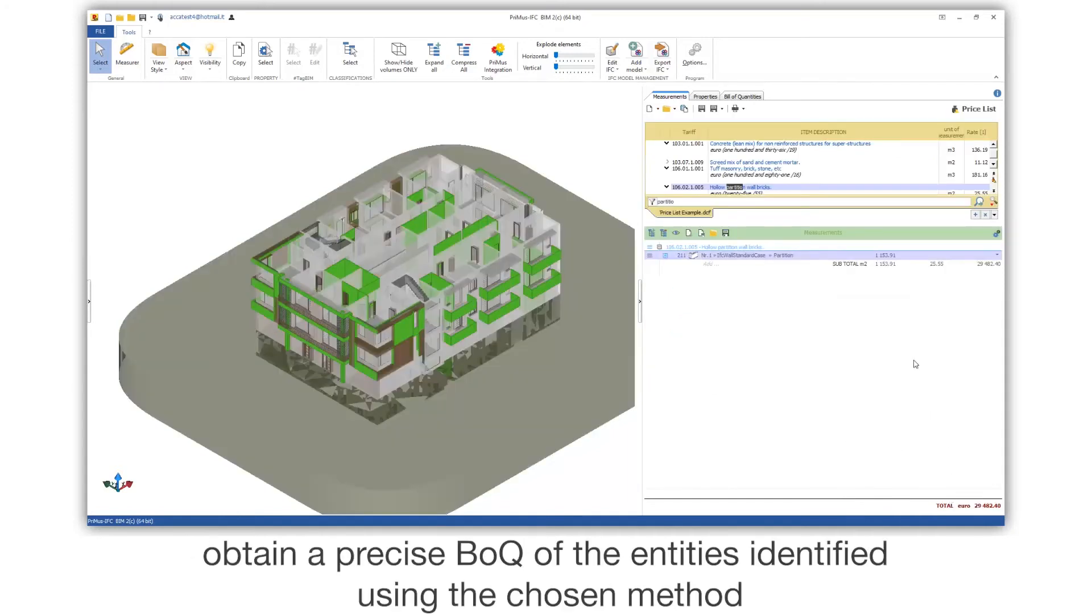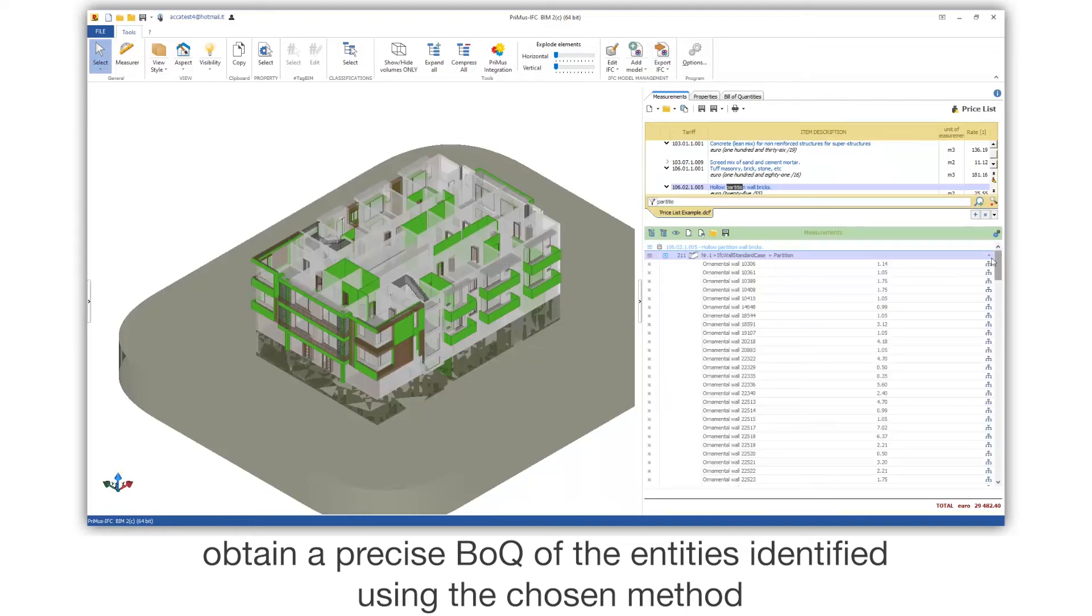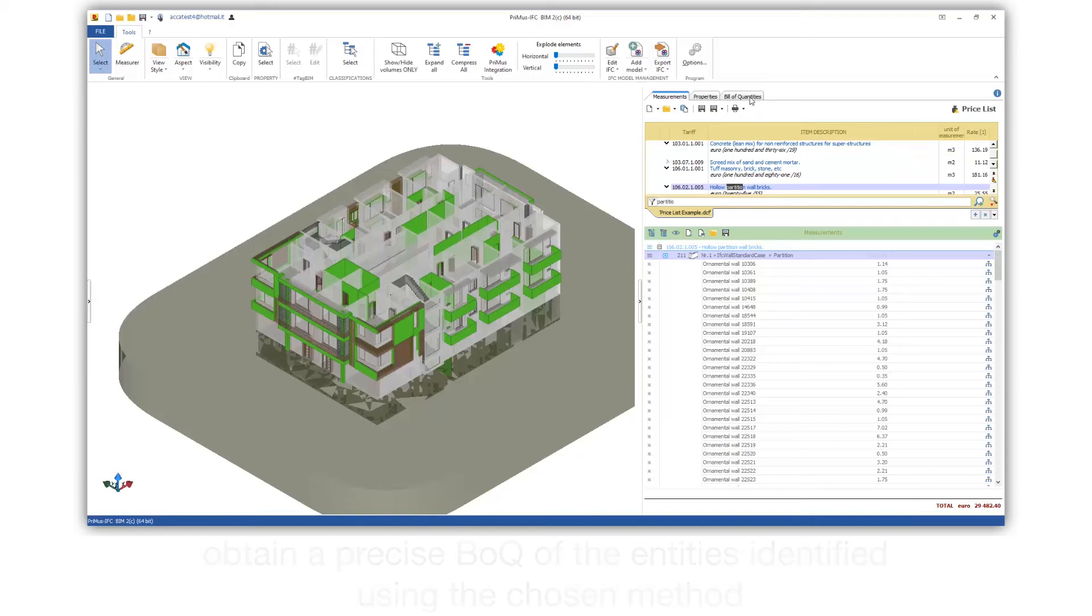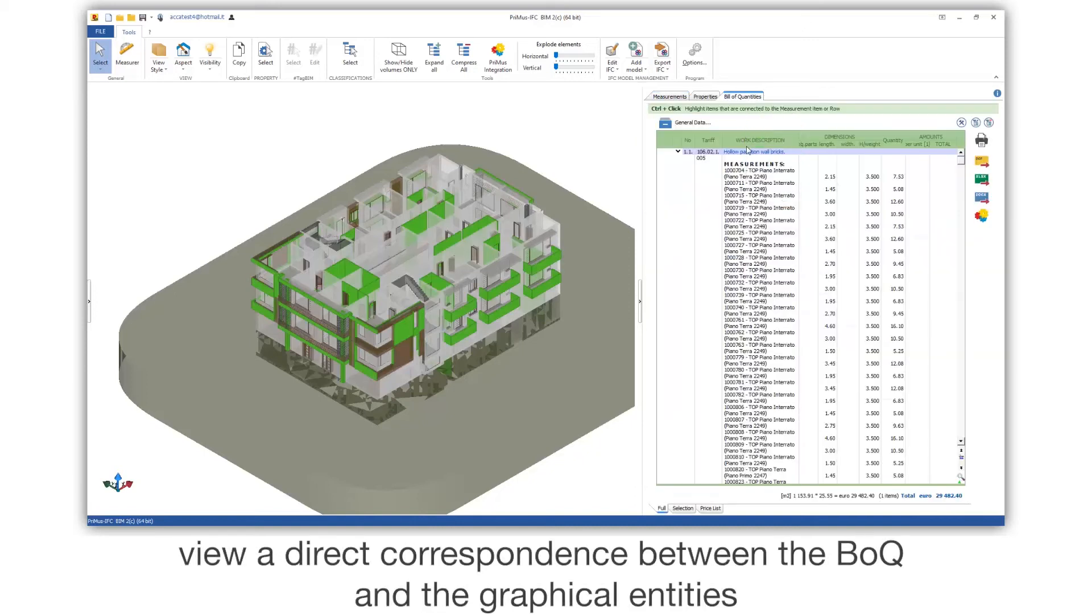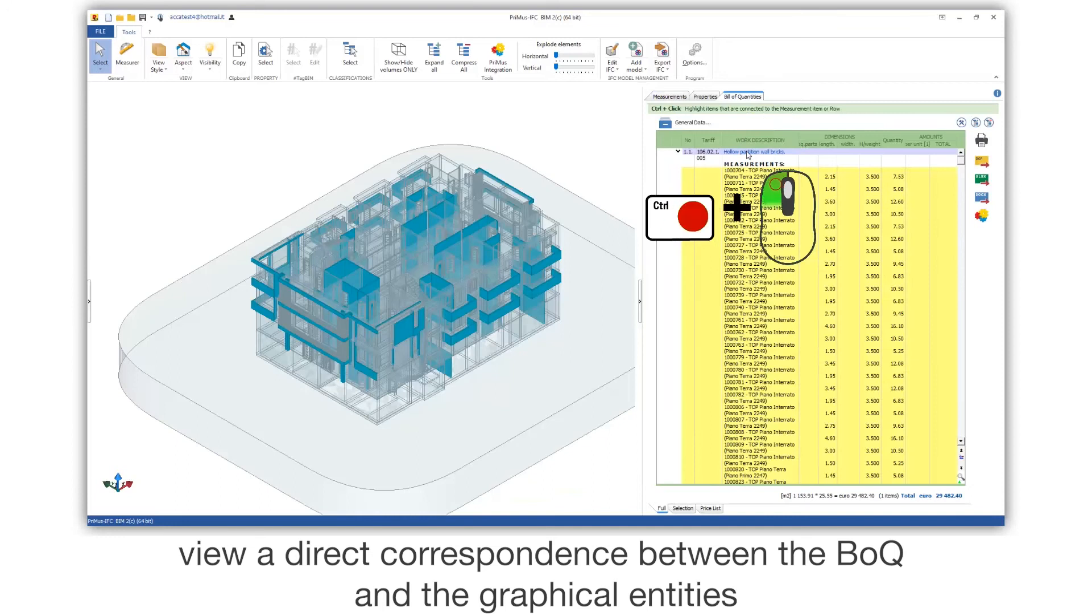Obtain a precise BOQ of the entities identified using the chosen method. View a direct correspondence between the BOQ and the graphical entities.